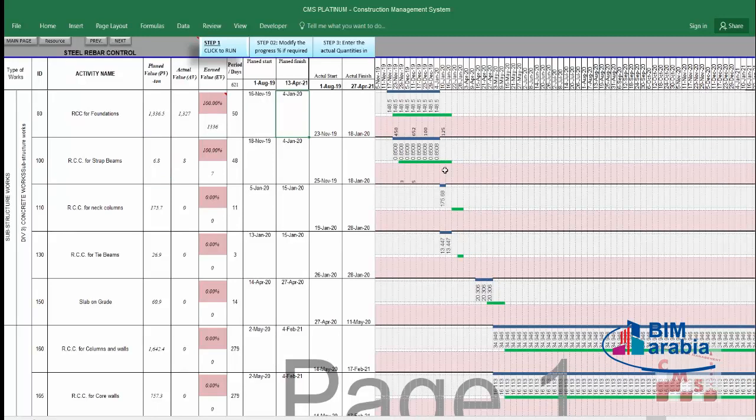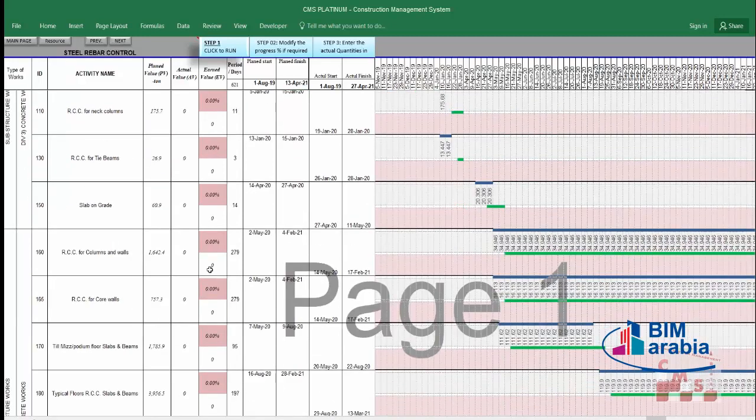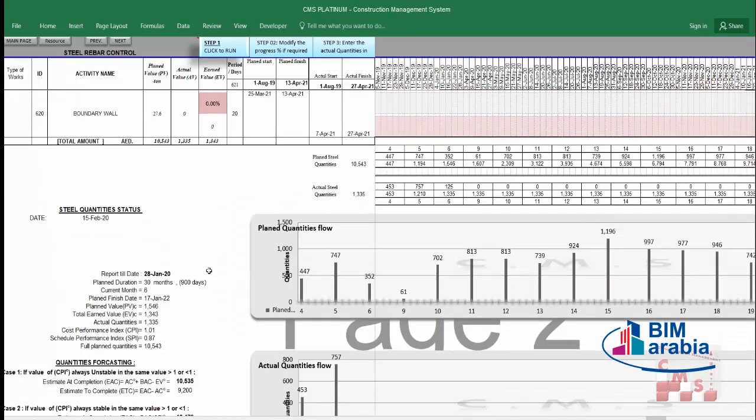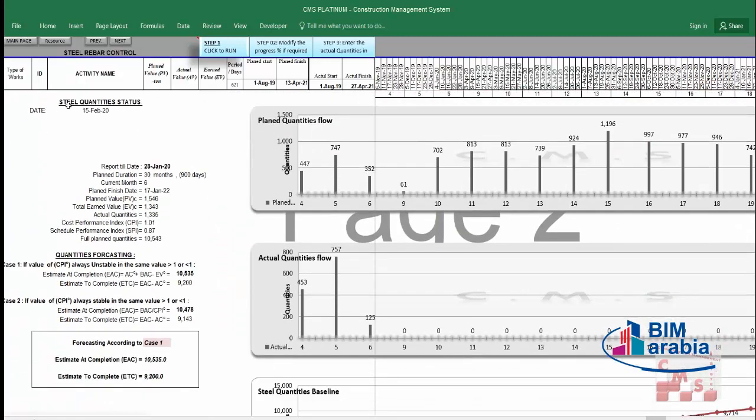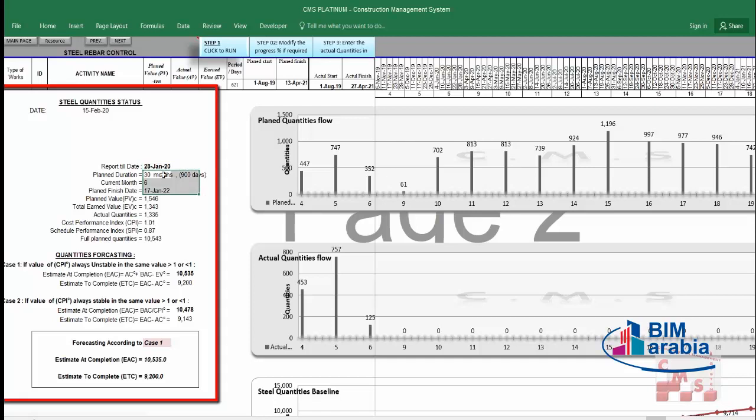And according to the actual consuming, which you already inserted now, you will have the status report for the consuming of the rebar here. You will have here steel quantity status for this date, the report till this date, which is the cutoff date. Here is telling you also information about the project, the duration of the project, the current month. Here is the planned finish. Here is the planned value for the rebar work. According to the planned value, we should complete 1,546 tons,